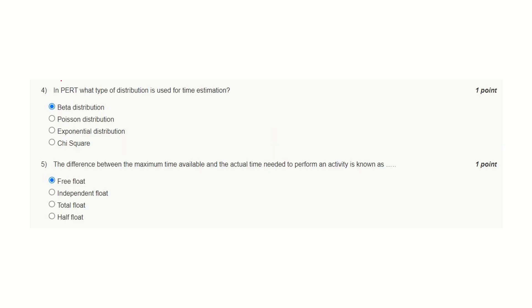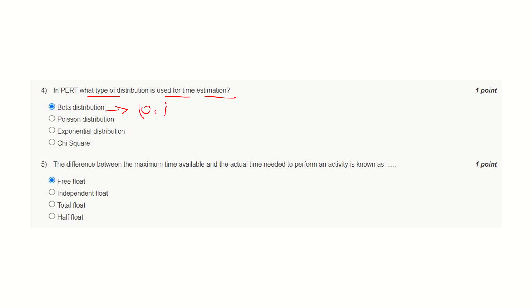Question number four: In PERT, what type of distribution is used for time estimation? Beta distribution is the correct answer. Beta distribution is plotted on a limited scale, that is 0 to 1, while such condition is not there for Poisson distribution, exponential distribution, or chi-square. This is the correct answer because of the limited range of this type of distribution.